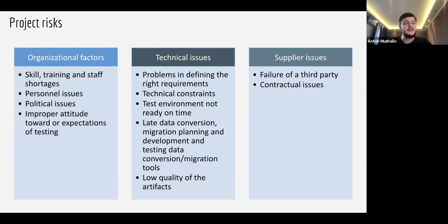And the third piece is supplier issues. It can be a third party that is supplying, let's say, graphic cards to you, and you have to test your application on each new version of a graphic card. You're expecting to receive a graphic card, but the supplier says, I'm sorry, it will be delayed by about 3 weeks, and it doesn't fit your release schedule. What are you going to do here? QAs can help establish a backup plan for what we're going to do if there are delays in shipments. So all in all, project risks might also be addressed with the help of QAs.